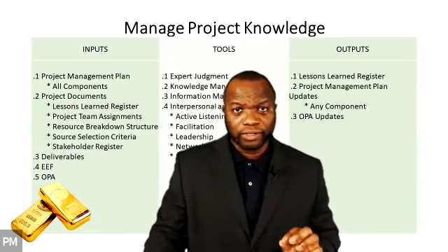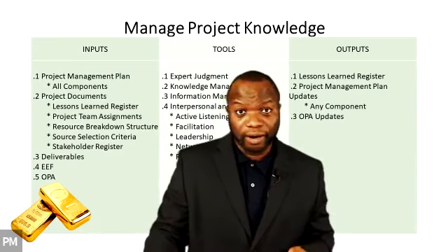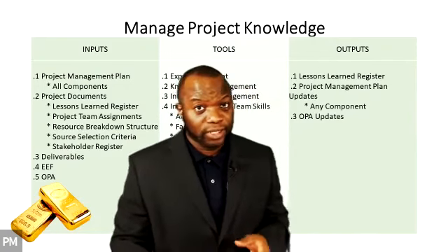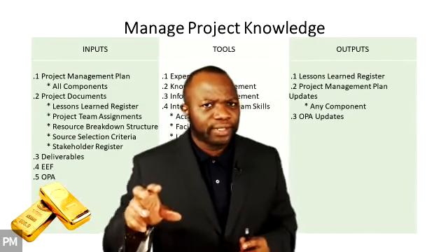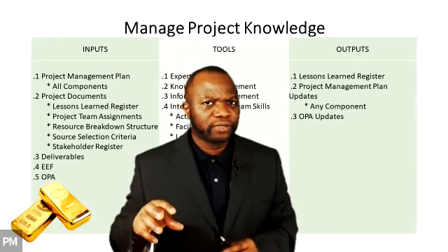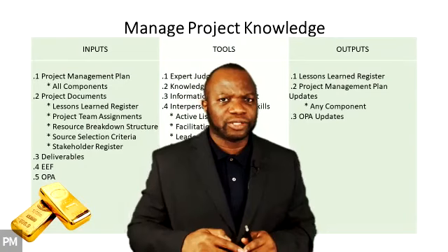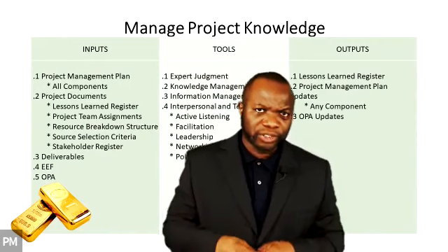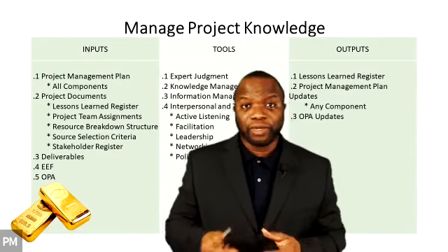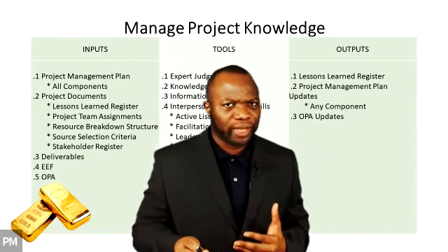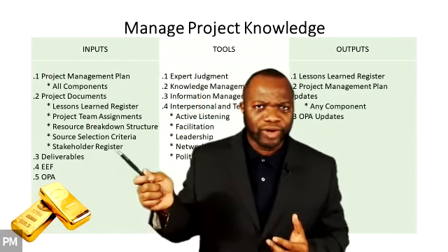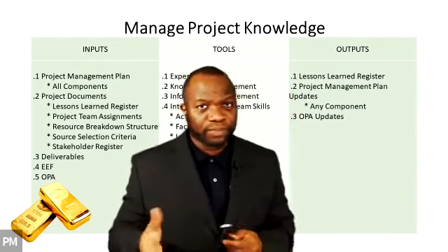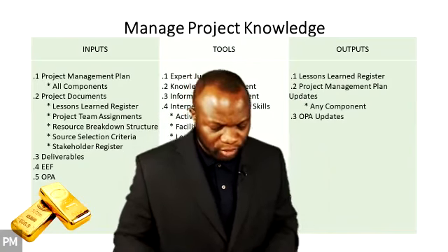LLR, lessons learned repository, or LLREP. So you don't confuse this with the LLREG, the lessons learned register. You see, lessons learned registers from various projects become part of a lessons learned repository at a higher level, combining lessons learned from many projects, and then ultimately that becomes part of the OPAs. That's what they're talking about. So think about it. Lessons learned registers all go into the lessons learned repository, and that becomes part of your OPAs. Very important to remember.